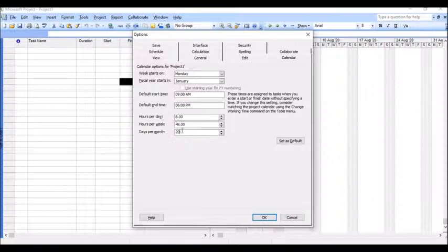So I already mentioned in the previous session that I have taken a default calculation for making the schedule. Each and every month will have 30 days. Except for Sundays, all the rest of the days will be working days. So it is 30 minus 4, 26 days as working days. We are scheduling for a 6-day working calendar.